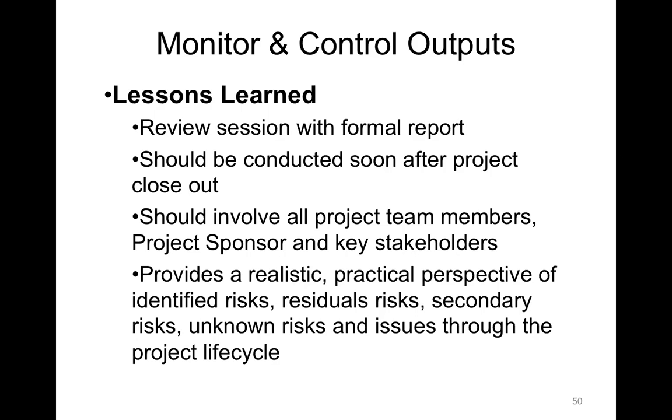So, this provides a realistic, practical perspective on identified risks. You're only going to know this if you're monitoring, controlling. So if you're not monitoring, controlling, you're not going to know if things worked or not. So that's why it's in monitoring, controlling. So looking at identified risks, residual risks, secondary risks, which are risks created as a result of an initial response plan, the unknown risks that you have incurred throughout the project, you would know that through monitoring, controlling. And then any issues through the project lifecycle would be in lessons learned.